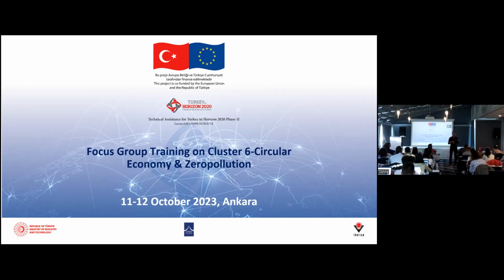When we expect to achieve the expected outcomes are again expected benefits, as well as expected impacts. However, as we've seen, expected impacts we expect to happen within 5 years. Expected outcomes are benefits from the project results by the end of the project. By the end of the project. The European Commission definition says by the end or shortly after. But shortly after is a little bit vague. What do you mean shortly after? By the end of the project, because you're going to have an advantage. So make sure that you have a clear timeline when you will achieve those expected outcomes. So benefits from your project results by the end of the project.